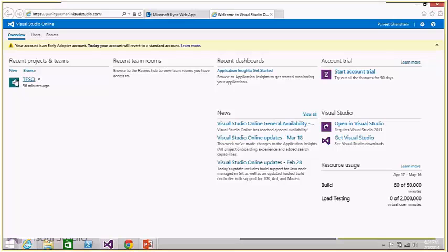Now you can keep on creating these backlog items, and when you go to work, now you'll see that backlog item here. Now this backlog item may have multiple sub items in it, which are part of the same sprint one. So you can click here and say, fine, let me go ahead and add a task in it. So you can keep on adding tasks. And if you have a big team, which on this demo I don't have, you can assign the tasks to them. If you don't have a team, if you're a single person working on it, you can still use TFS because it at least helps you to have the code checked in and maintain the history of the code.